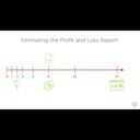But if you feel that it's less complex than the pie chart, but more complex than the online health feature, then you should assign it a 3 or a 5. And of course, if you feel that it's more complex than the pie chart, then feel free to assign it any value over 8 that's part of the Fibonacci sequence. This is where the question mark comes in.